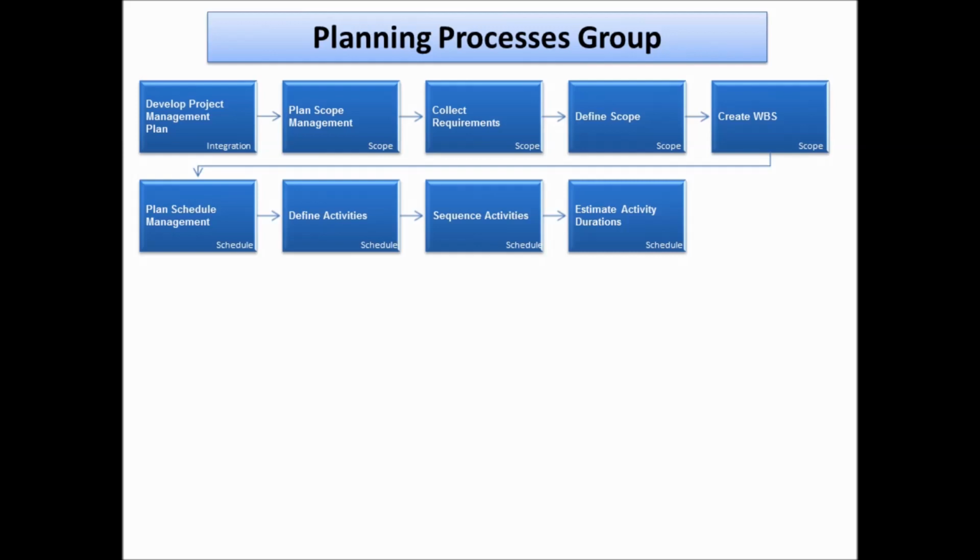Are we talking about 50 hours worked in a work week by two people or one person? Or is it 50 hours that needs to be spanned across months because we are waiting for some dependencies, like, let's say, lab results are awaited? It has to be available. So we use multiple tools and techniques here to estimate. A couple of examples I can think of are analogous estimation and parametric estimation, and a couple of others which you can go through in the PMBOK guide.